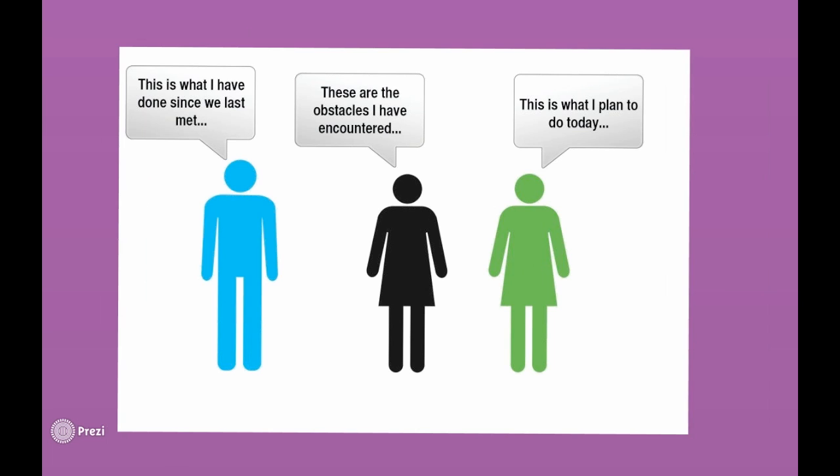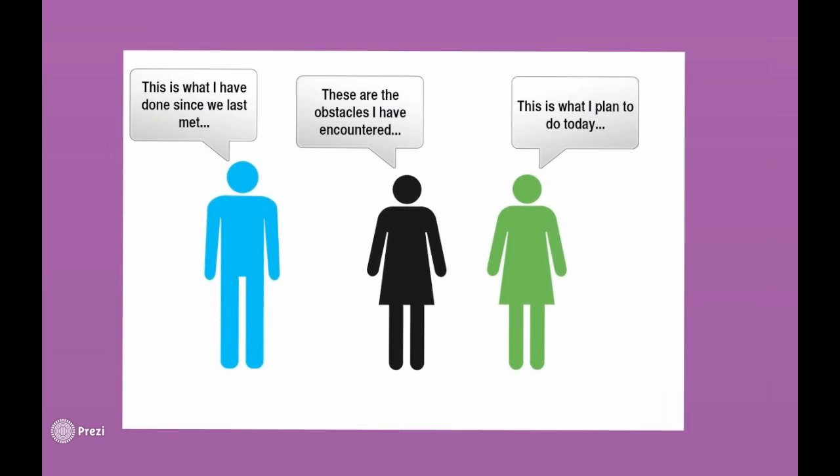But any sprint that goes longer than 30 days is a little bit more difficult to manage, because people lose that ability to hold themselves accountable. If you have a shorter time frame, the deadline's a little bit tighter. It promotes a lot better focus.